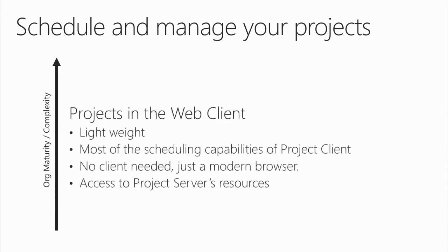So from there, the next step is using Project Web Client. Whether it is a SharePoint task list project that you flipped into being a managed project, fully project managed with the schedule, or you want to create a new one, you can go to the web client and start implementing a project there. The nice thing about this is that in the 2013 release, we moved the scheduling engine from the client to the server also. So it's the same scheduling engine that you have running in your desktop client that runs on a server also. So there's definitely parity between the two, and there's almost 90% of the capabilities that you have in a project client you have here.